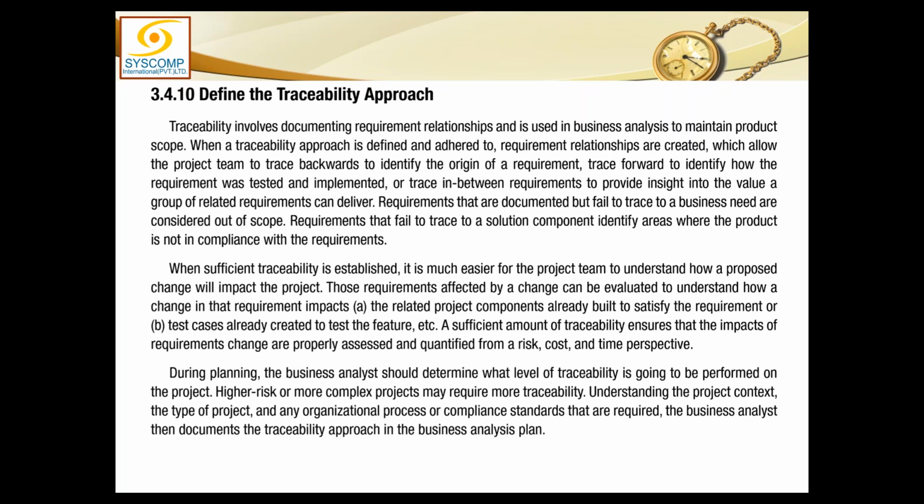So you see, the requirement can be traced forward to all those things. If there is one requirement which is no more required, then you have to eliminate all those activities or tests which are designed only for that requirement. Because if this requirement is no more, those activities are also redundant.